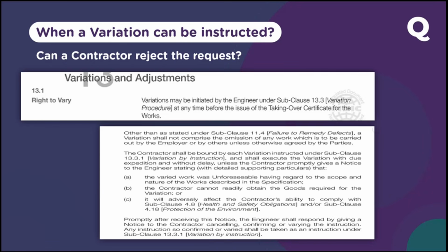Similarly, if during the excavation the contractor finds some asbestos and the client is telling you to clear it immediately, but asbestos you cannot clear immediately, and as a contractor you cannot do it at all. For that you need to get specialized people. They have to come to site and remove it. There are specialized methodologies. They will put on a big mask and specialized equipment to remove it.